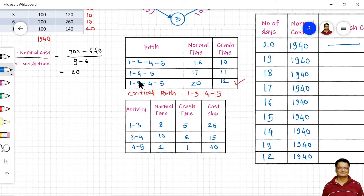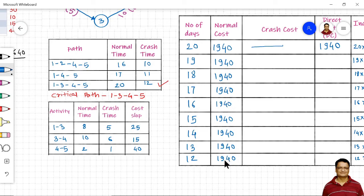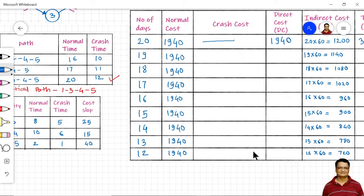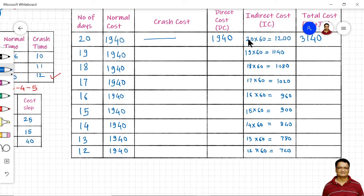The critical path has normal time 20 days and crash time 12 days, so the project can be crashed from 20 down to 12 days. I have represented values from 20 to 12 in descending order in the table. The normal cost remains constant throughout. The indirect cost can be pre-filled: for 19 days it is 19 × 60 = 1140, and so on — as project duration reduces, indirect cost also reduces, but crash cost will increase.